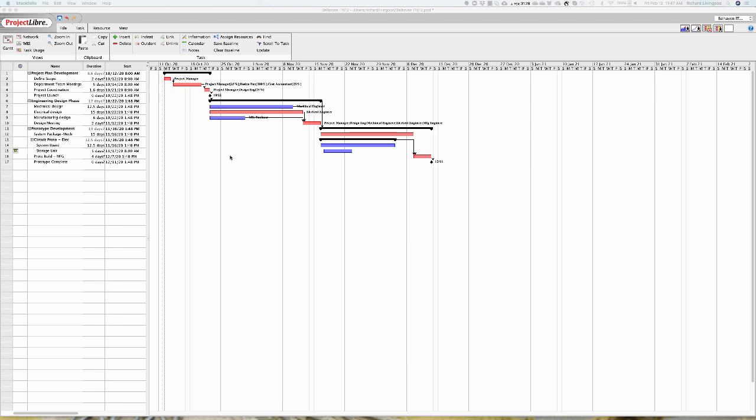You consider something as simple as, let's say, $50 an hour for each one. You take 5 teams plus the project manager, that's $300 a week. And in a month, that's going to cost you $1,200. And over 6 months, that's going to cost you $7,200. So you want to know that it's there.